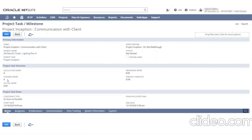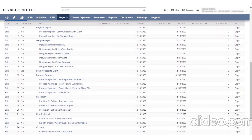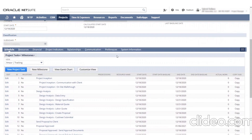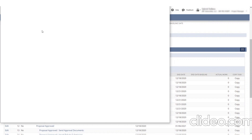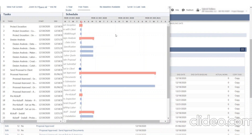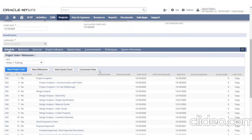Each of these tasks has a certain amount of planned hours assigned to it. Steven or someone within the office would be the ones updating all these things. The additional thing that's going to happen is that we're going to have these predecessors populated so we can look at the Gantt chart. Right now the Gantt chart isn't properly filled out because they all have the same date, but once we have the predecessors, it'll be filled out in the proper way.